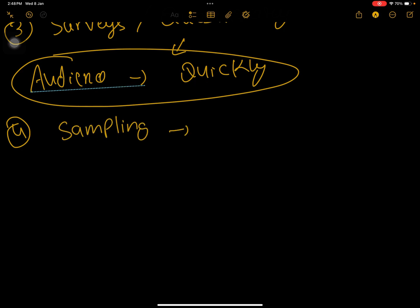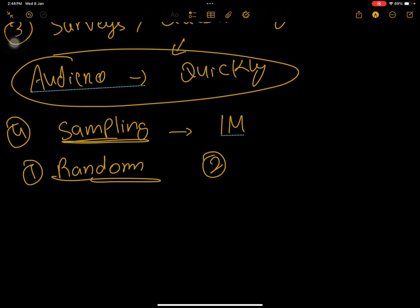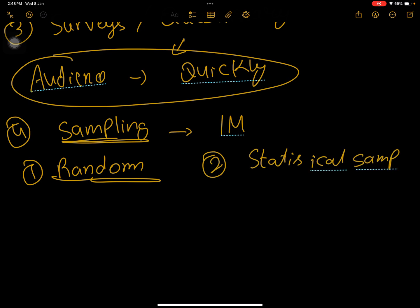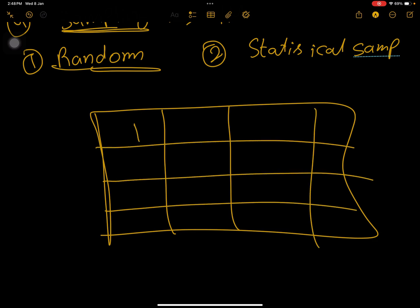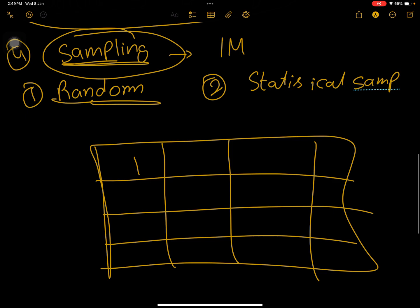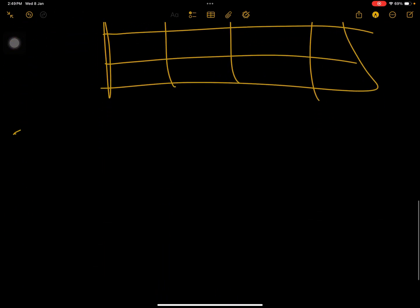We also use sampling. Let's say there are one million products in an organization — you cannot check all of them. Sampling can be random, like how a customs office randomly checks some items. The other type is statistical sampling, where after every fixed interval — say every hundred thousand units — you check that product to see if it passes or fails. This gives you immediate data on product quality.